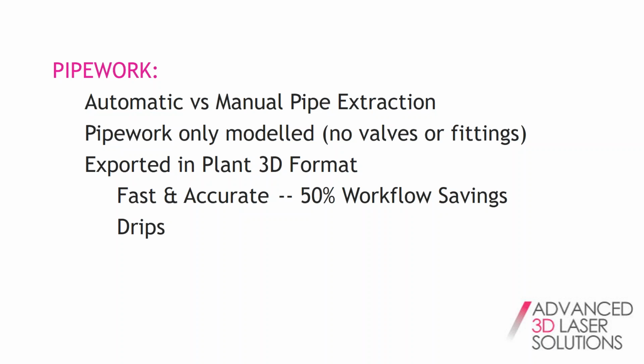For instance, we did an oil storage depot, which is quite a small depot. It only had about 9 tanks in it and 5 road loading bays and whatnot. Originally, it took us 3 months to model it out using this manual pipe extraction software. And this manual pipe extraction software had a lot of bugs in it, but I'm not going to go into that too much. Once we'd used Edgewise, we did a similar size depot, and we were able to complete it in something like 4 weeks, I believe it was.